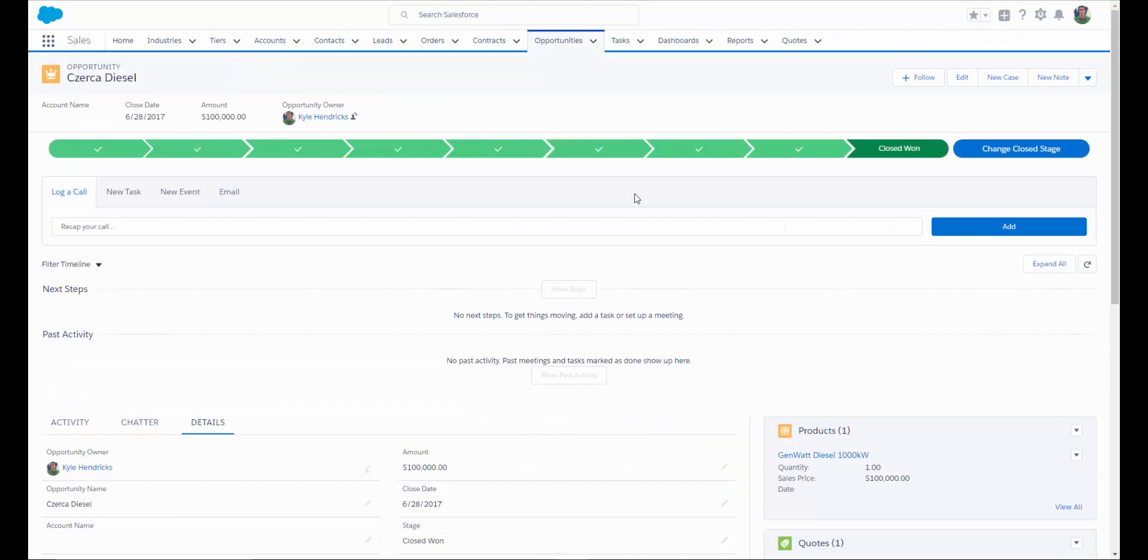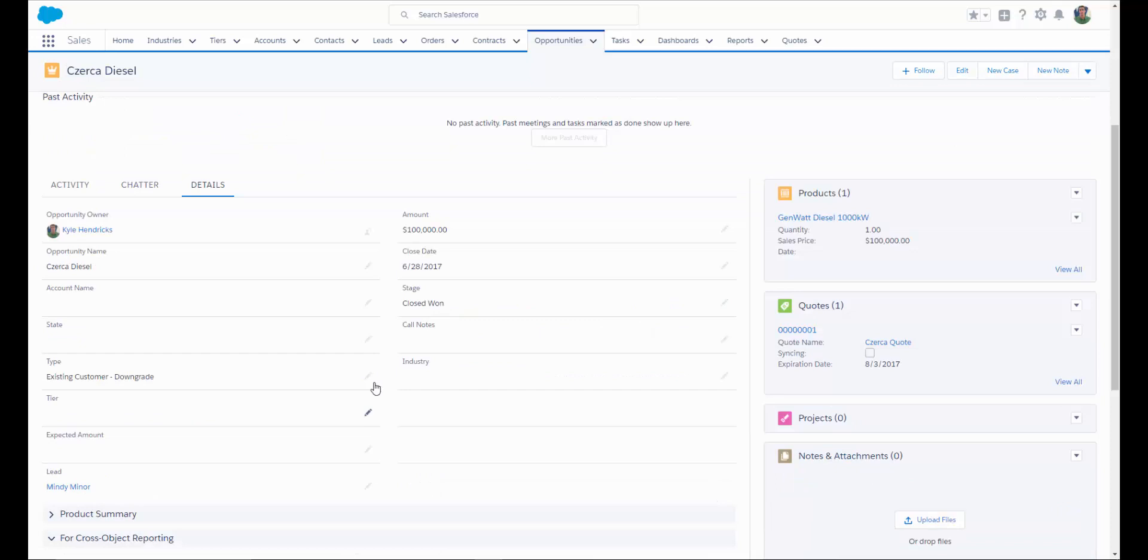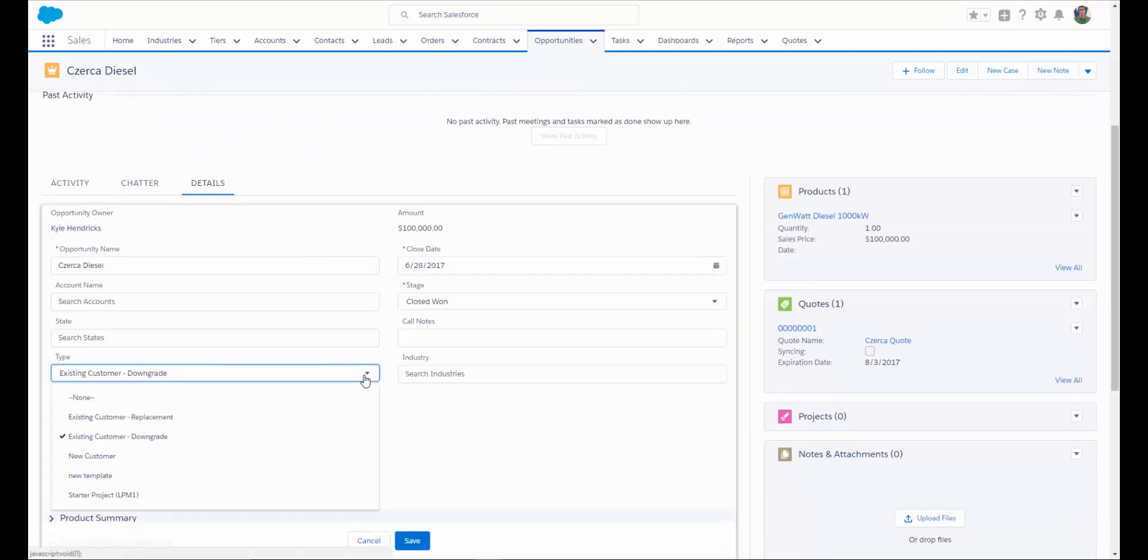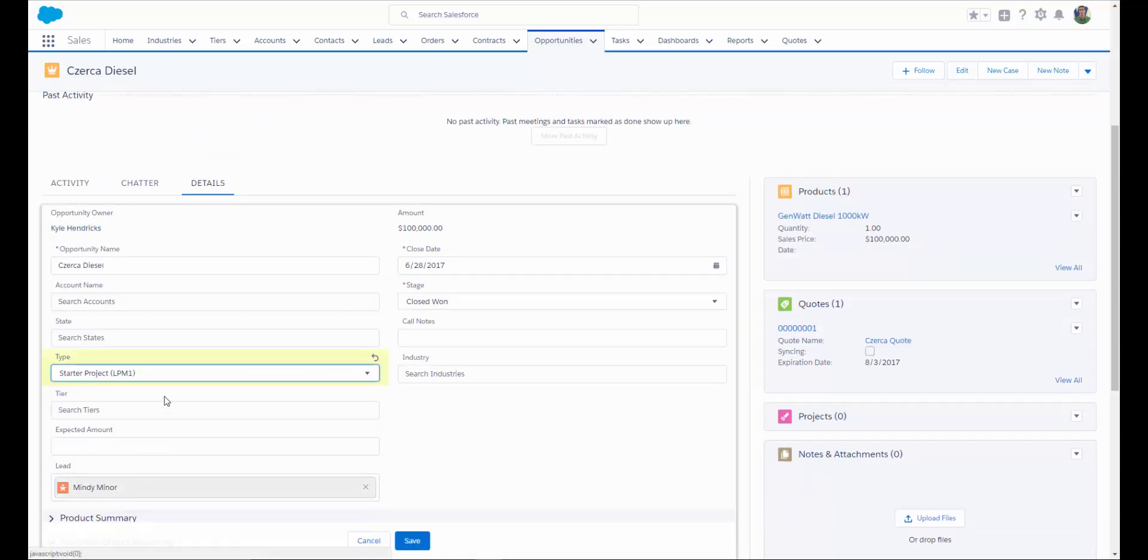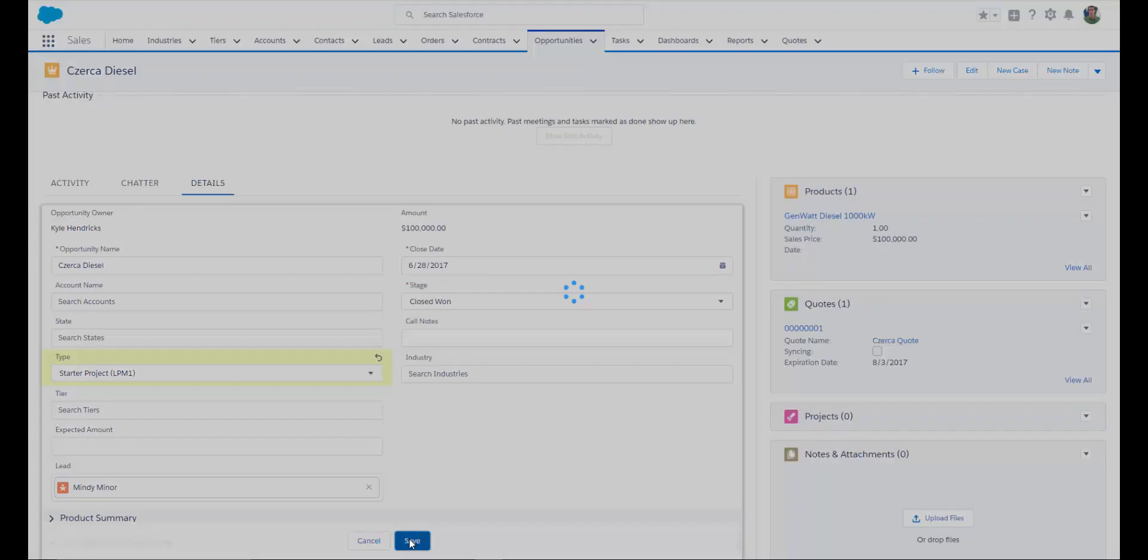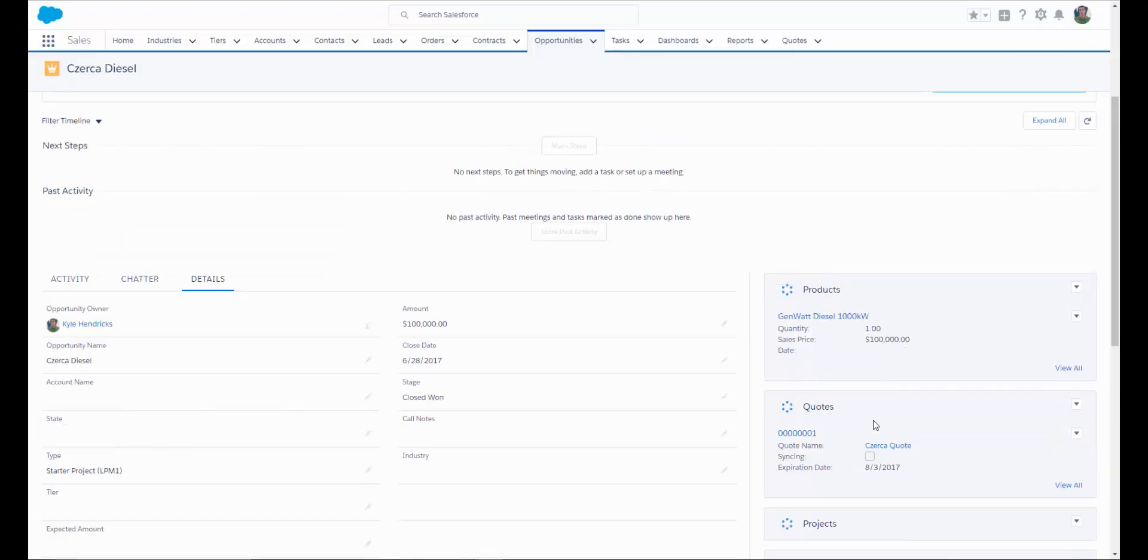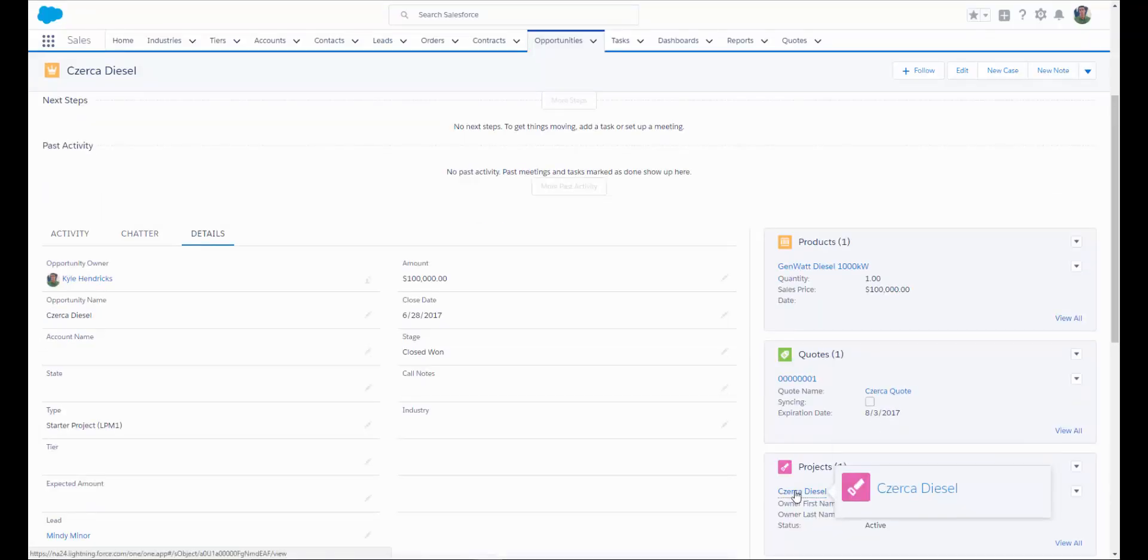There are a couple of different ways that you can automate your project creation process. If, for example, you would like to create a project automatically when an opportunity is marked closed won or reaches a certain stage, we have trigger available that you can easily copy and paste to add that option. And we'll take a look at that here in a second. What we have set up here is a pick list that a user can simply select the type of project that they need to create and save the opportunity. Once the opportunity saves, you'll be able to see that a new project has been created based on the template that they selected with all of the milestones and tasks already in place.